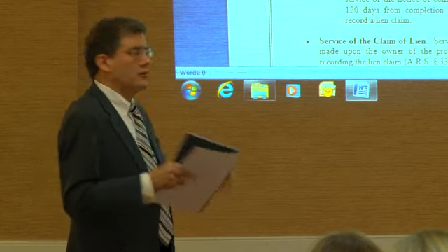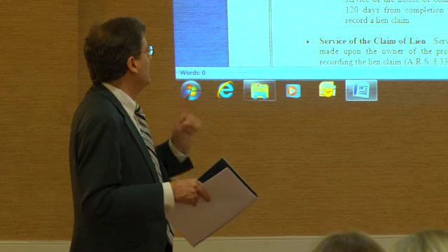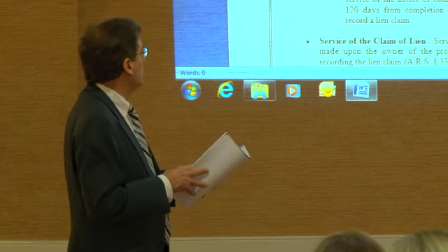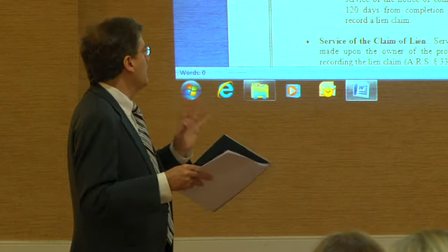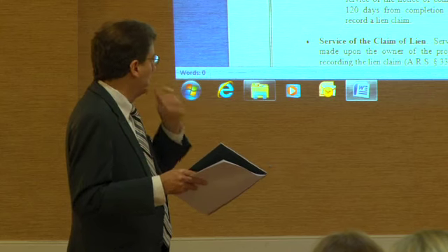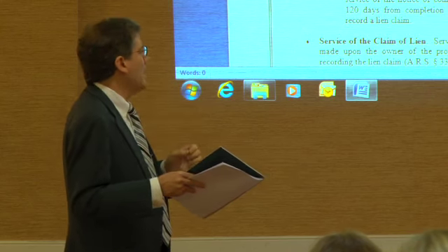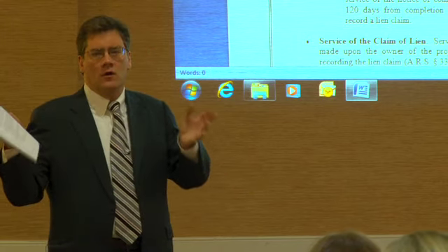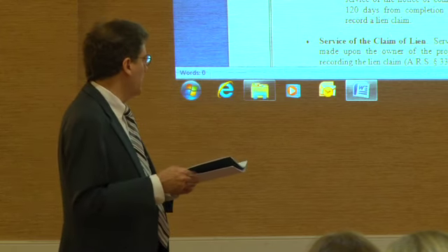All right? So it doesn't matter when they record it, but once they record it, they've got 15 days to mail the copies of the statement of the date of recording to the owner, the general contractor, and all the parties who have been properly served a valid preliminary notice. In the face of late service of the notice of completion, what happens? It just is of no effect, and you are left with your original lien claim rights, which put you back in a 120-day time frame.